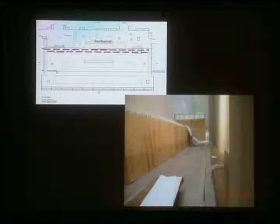But just in case of an equipment malfunction, everything in this case, art, the storage, shelving, and surfaces used for exam, were covered against possible invasion of gray construction dust, the unwelcome byproduct of every demolition. Because we couldn't build any walls or other protective structures over this large area, all was covered with 2 layers of plastic. So beyond this area is where all the art is.